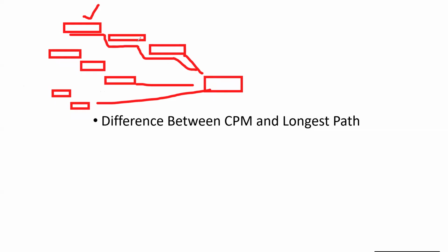Now the second way, the longest path. This is CPM: when we are not giving any finish date to Primavera P6, we are only giving relationships and durations, and we are adjusting those relationships and the end date in our own way, the way I'm doing right now. That is defining the critical path method. I'm saying this is also the longest path, and Primavera P6 is defining it well. It is not something wrong. But what is the difference now?